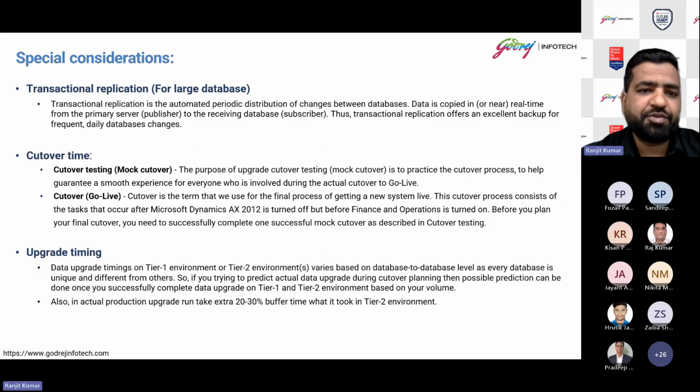Special consideration. This is very much important while you do the final cutover and pre-go live. Based on your experience of the sandbox environment and the data upgrade, we should estimate our pre-go live and final cutover. Once the cutover time is planned, we need to do some mock cutover. It will help guarantee a smooth experience for everyone involved during the actual cutover go live activity, when you are planning it.